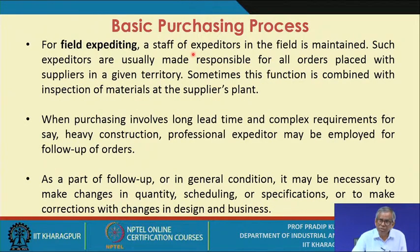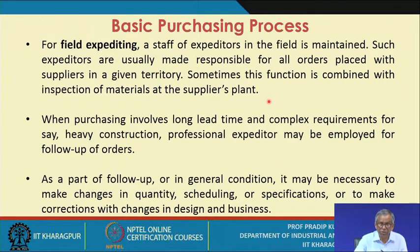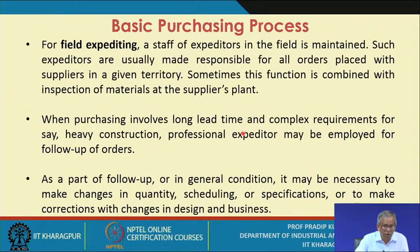For field expediting, this is an important activity in any purchase department. A staff of expeditors in the field is maintained — in a specific area such expeditors are usually made responsible for all orders placed with suppliers in a given territory. Sometimes this function is combined with inspection of materials at the supplier's plant. When purchasing involves long lead times and complex requirements for heavy construction, a professional expediter may be employed for follow-up of orders.